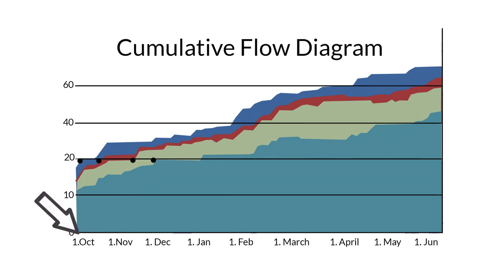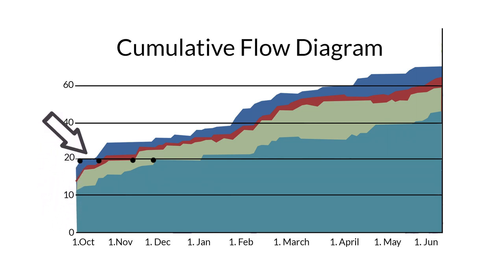If we look at October, we can see in the blue area that 20 customer requests were made, and we can also see that these requests were completed and delivered by the beginning of December in the turquoise area. This lets us know that our cycle time is about two months.